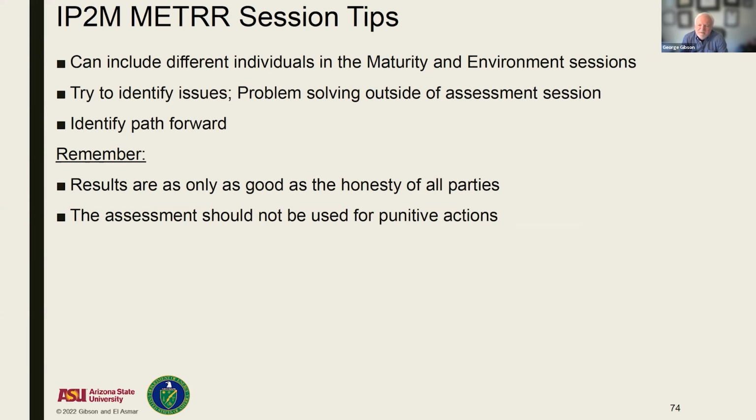One of the things that happens during the session is, if you've got people that are very technical oriented and we identify a gap, many times they'll try to solve that gap right there. That's not the point. The point is to identify the gap and then after the meeting, try to solve it, because we can bog down and take hours trying to solve something in a meeting. And we don't want to do that during the assessment. Remember, what you're trying to do is figure out where you are today and doing it in an expeditious manner, but a manner that's meaningful as well.